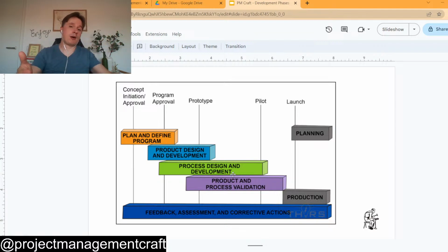And the interesting part of using this automotive standard is that you already have a list of the deliverables that you're going to need, like a design review, FMEA, design validation, and a lot of other documents that you are going to need to make sure that you can progress like that.